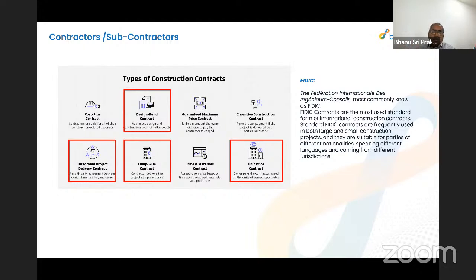Another thing is the lump sum contract. Lump sum contract is very, very popular in the Gulf. We get a lot of complications because of that. That's why our design drawings need to be full in information, complete in information, and completely coordinated. So the demand is very high. I do work in India also. A lot of times, even huge projects like 40-story buildings will start with 50% of the design. One of the recent examples is a very popular builder, I can't take names, where we were signed and were supposed to work on the BIM.